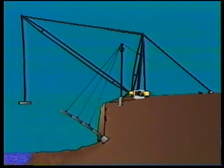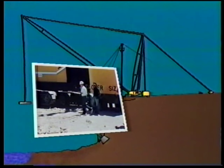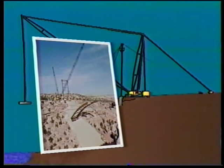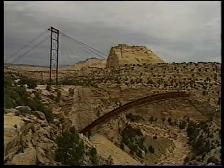One of Jake's rigging superintendents spent a full week with Olson Beale's crew and crane operator, familiarizing them with the operation of the American 9310 Skyhorse and the luffing towers. When they finished setting west rib pairs numbered 1 through 4 and were getting ready to use the guy horse, one of Jake's rigging engineers went to the site and rehearsed the guy horse procedure with the whole crew. He also helped them with the first guy horse lift.